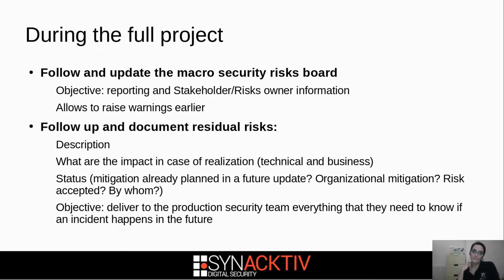So during the full project, you have to follow and update the macro security risk board that you've written at the beginning, and the objective is clear reporting. Okay, it allows you also to raise warnings earlier. If the risk stays high during the full project, I don't know, for a 3-year project, and 3 months before launch you're still high at the risk, you have an issue.